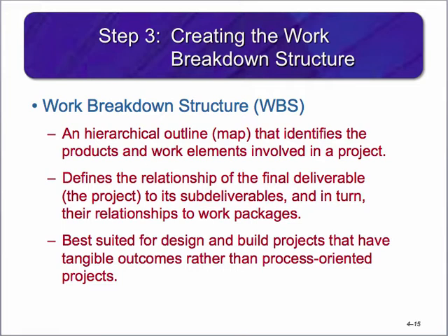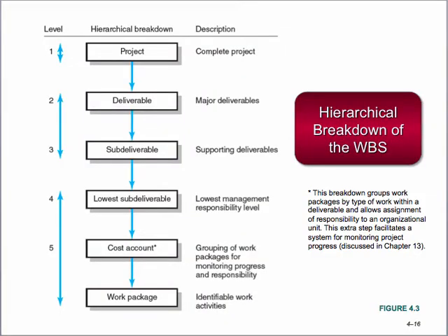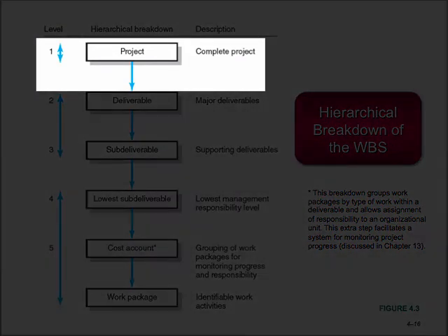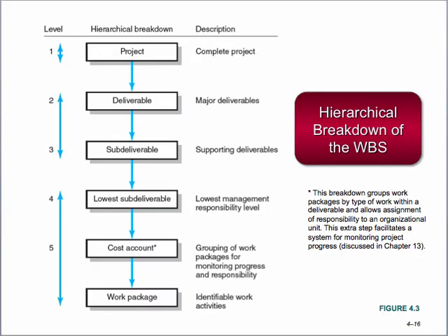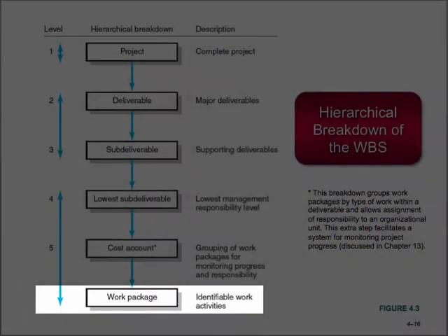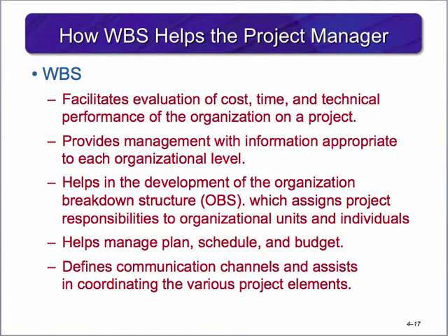Each descending level of the work breakdown structure represents a more detailed definition of the project deliverable. The actual planned work is found at the lowest level in the work breakdown structure called work packages. Here's a visual look at the hierarchical breakdown of the work breakdown structure and its associated description. You can see that it starts with the largest deliverable, the project, and works its way down to the smallest deliverables, work packages.